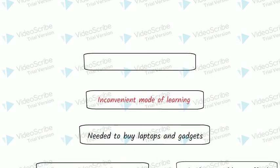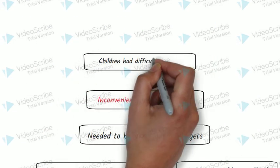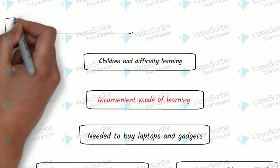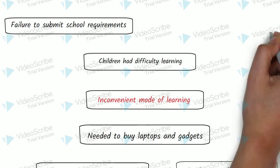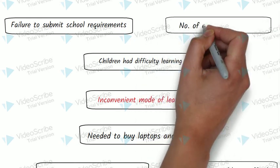From the causes, we proceed to the effects. Because of inconvenience, children had difficulty learning. And because of this difficulty, they failed to submit school requirements. And then the number of enrollees dropped.